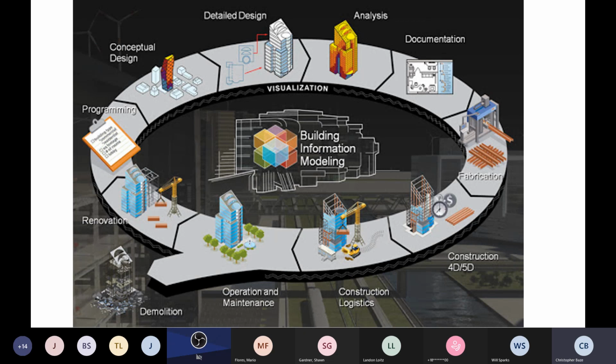Right now you manually have to input that information into Construction Site to show how many walls you have, how many layers of gyp, what's the square footage of gyp, what's the linear foot of track, and it doesn't talk well to other solutions yet, but I know that they're working on that, and I think the key is making it more BIM driven. When you have BIM, you have a unique identifier, they call it a global ID, for every element in the project. And whether you're using Oracle or P6 or Construction Site, I know that Versatile already takes advantage of this.